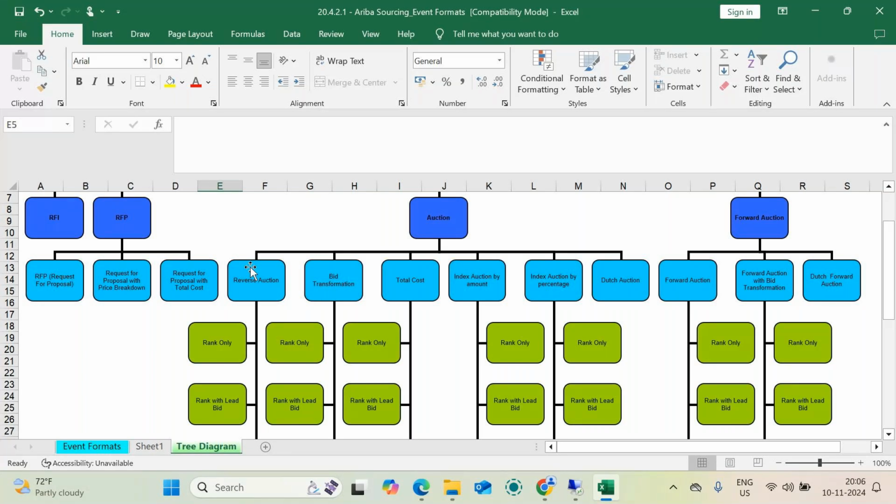In the auction we are saying that if you want to negotiate, you have to negotiate below this price, because we are not going to discuss 20,000 rupees, that is the higher side, because we already got the 10,000 rupees price from the market for the same material, same specification, from the same city. So there is no difference, it is an apple to apple comparison. That's why the strategy is that we are going to negotiate through reverse auction. So this is the ceiling value we have decided.